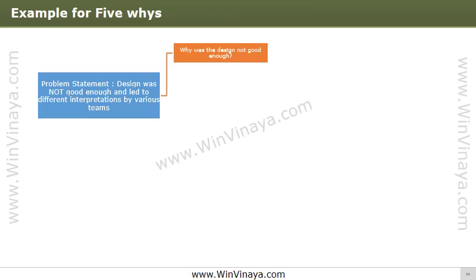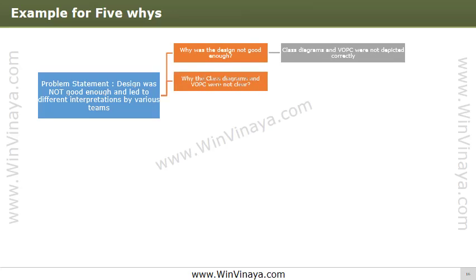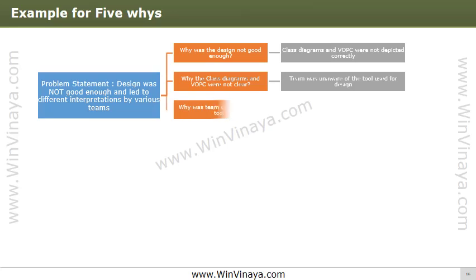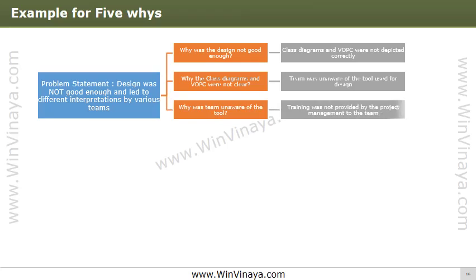The response would be: the class diagram and VOPC were not depicted correctly. Then ask: why were the class diagram and VOPC not depicted properly? The response could be that the team was unaware of the design tools. Ask again: why was the team unaware of the tools? The response could be: lack of training.